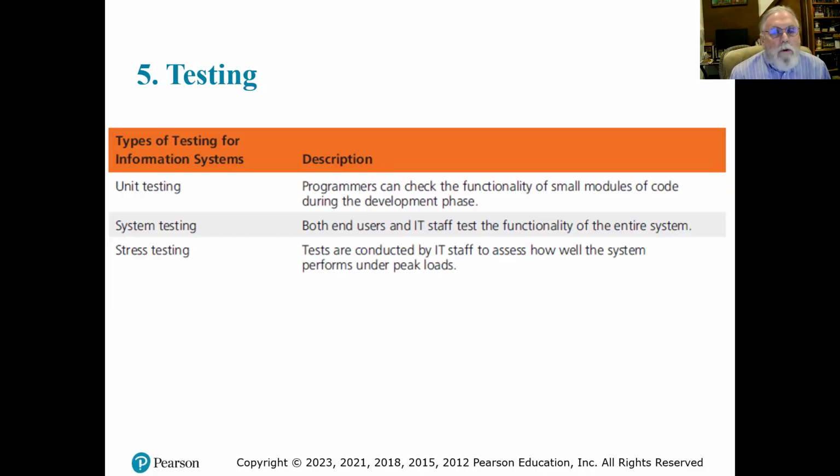And then another concept is this idea of stress testing. And this is where your IT department can simulate a maximum load situation. What happens when 100 users are trying to input data all at the same time? Can the system handle it? In at least one of the failed ERP implementations, I believe it was the power company, it got overloaded due to a hurricane came through and knocked power out. And so the inputs coming into the system were far greater than normal. And the system just couldn't handle that many requests coming in because they had not adequately simulated stress testing.